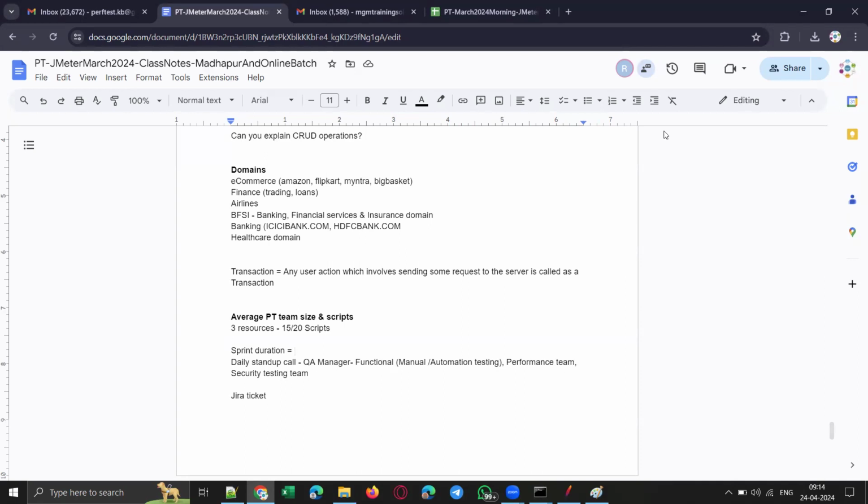Yeah, one sprint, one PI, it will take like 2 months or 3 months. One sprint will be like 10 days. Right, 2 weeks in general. So sprint duration will be 2 weeks or 10 business days, isn't it? 10 business days means excluding weekends and all days. So sprint duration would usually be 10 business days.